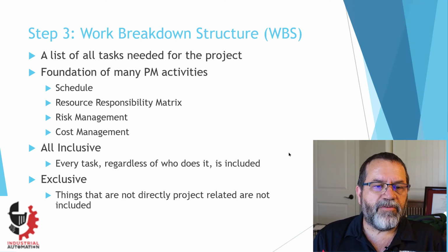Two important parts about it: first of all, it's all inclusive. Everything related to the project goes into the work breakdown structure. It doesn't matter who's doing it, who's responsible, who's paying for it. You put everything that's involved in the project in the work breakdown structure. Second, it's exclusive. You don't add things that are not directly related to the project.